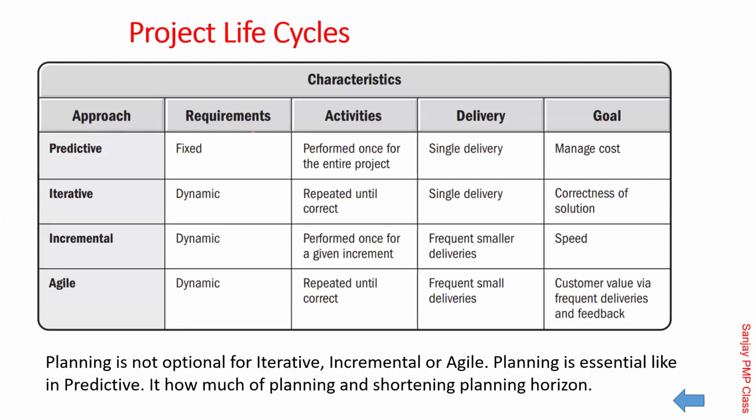Then those types of project life cycles, predictive and agile, are the extreme ones. In predictive, everything is linear; in agile, you are deciding the goals as you walk. You are flexible enough to accommodate change, and that is done through a combination of a product backlog, which is a complete long wish list, and below that a sprint backlog, which is a short-term thing,